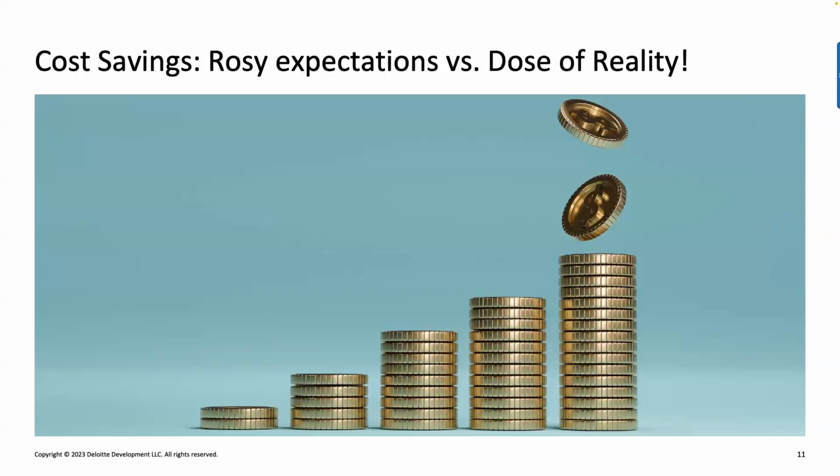Now, the cost, again, one of the key fundamental issues that we see with clients when we look at their vision statements or business case is the fact that you have these rosy expectations when it comes to the cost. An example, you come and say, okay, I'm going to build a platform in about 3 months, and I'm going to start migrating workloads in about 6 months, right? Reality comes and you are into year 1 and you haven't finalized your platform. Why? Because it's complex. You have regulatory security compliance, you have PHI, PII data, you have layers of security that you need to implement, and the question becomes even more complex, right?